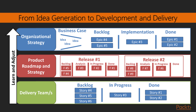To define the roadmap and strategy of a given product, we move to the lower level — the product and roadmap strategy level. A product is composed of features, which we will introduce shortly; we can easily intuit that these are the strategic capabilities of the product itself. The roadmap is defined through a sequence of releases. In line with agile principles, the most immediate releases have a more detailed view, while those further on the road are likely to be just drafted. Each release contains a set of features and relates to one EPIC, and a single feature can be contained by one and only one release. This level is where we work on the MVP — our first release is designed to deliver the MVP, and we could think of each release as a new incremental MVP. Within a release, features are managed by a Kanban Backlog–Analyze–In Progress–Done workflow.